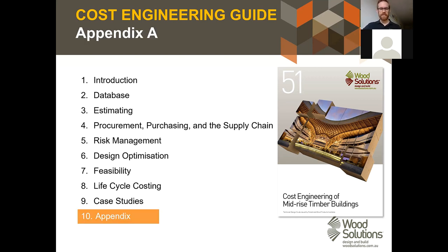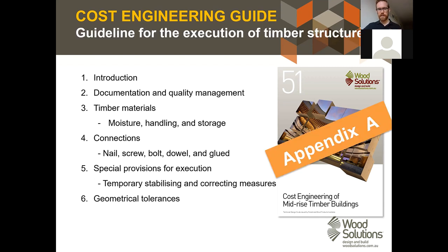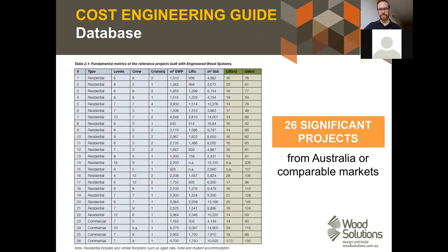So the guide finishes with an appendix, which is actually on the execution of timber structures, or I should say the installation of timber structures. So this can be really helpful for a quantity surveyor or anyone who has to go out and do an inspection on a mid-rise timber construction site, or anyone involved in the actual construction of the building, because it covers details like how you control for moisture, the tolerances you should be looking for, the types of connection and the right way for them to be completed. And it's generally a useful resource for you to consider during your inspections or during your construction.